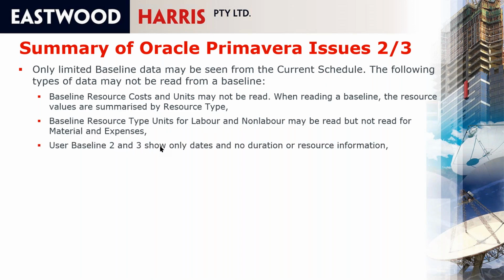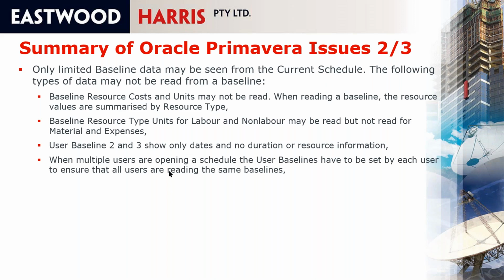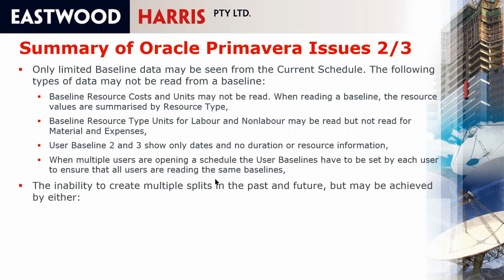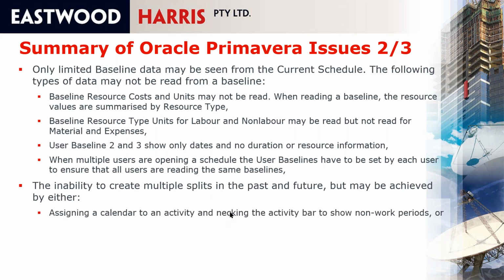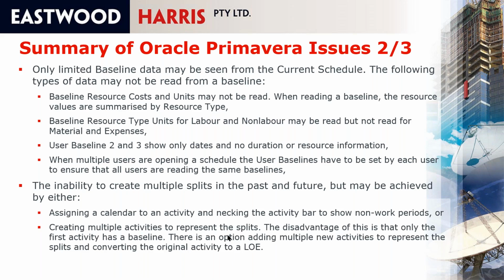Baseline 2 and 3 only show dates with no duration or resource information. Multiple users opening up a schedule must know what the other users have set as their baseline and reset if necessary. There's no ability to create multiple splits in the past and future, but you can model this either by assigning a calendar or creating multiple activities to represent the split, so you can overcome that issue.